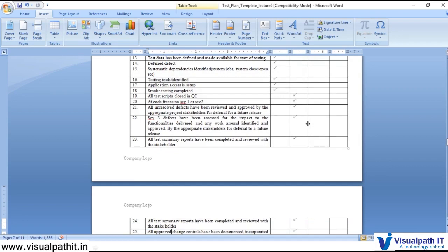So exit criteria is a criteria where we are good and we can give the sign off, and the change manager can proceed with pushing the code to the prod environment. So what the exit criteria are: whatever test scripts and scenarios we came up with, for which we got the approval, those are closed in QC. Those all are run and closed in QC.